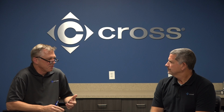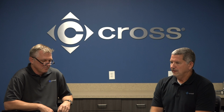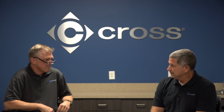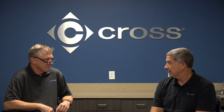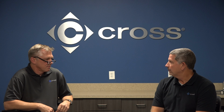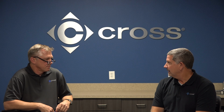And so why do they need this? They're asking for us to do this survey, and why is that? What do they get out of it? Well, a lot of times the sites really don't know what they have. A lot of the surveys we've done so far, they really don't know the equipment that's associated with the tank. They don't know that it is obsolete or if it's got long lead times to get in, so that if they do run into a problem, they're not waiting on equipment to arrive with the tank out of operation.